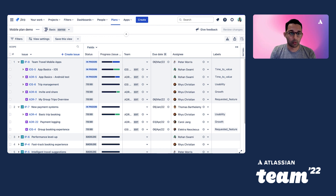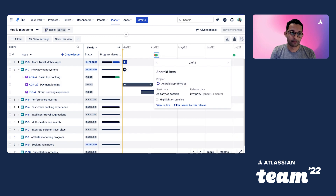We support a wide range of custom fields as well. Over here, you can see an assignee, due dates, and a label to represent a strategic theme. As teams progress with a project, issues assigned to sprints are automatically set to the length of the sprint, which will be updated in your Advanced Roadmap, saving you having to manually enter start and end dates for every issue.